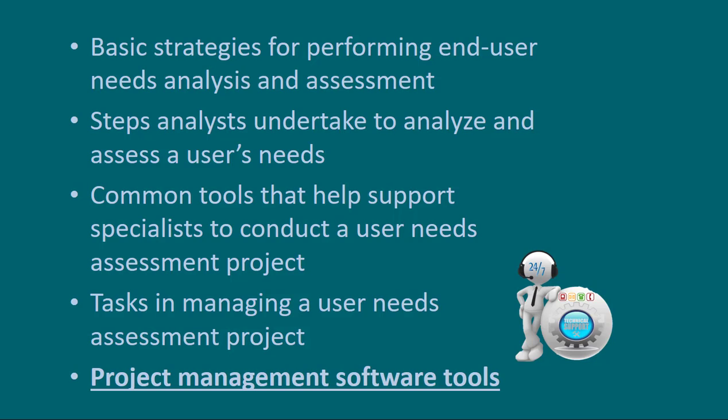This is the final step in project management, in which the completion is communicated to all of your stakeholders. You complete that final project report, and you look at the performance of the project and the participants, and then evaluate those. So some of the things you might ask yourself is, how well did the project team members function together as a group? Or what did we learn from this project that will help us manage future projects?